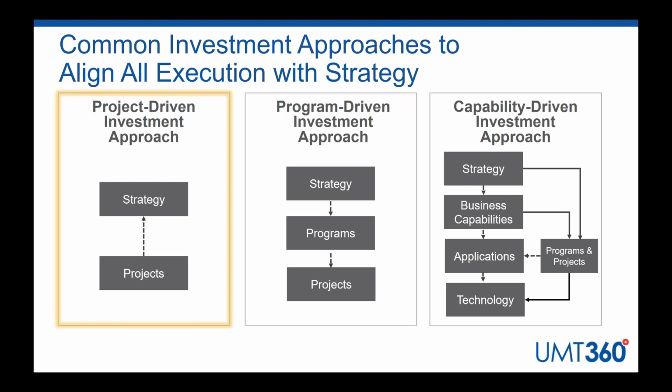First, the project-driven investment approach often starts with the definition and prioritization of strategy, often by execs and stakeholders in a silo. And then it's normally used in more traditional annual planning techniques. So when you hit that annual planning horizon within the year, project requests get teed up, whether they're going to be executed in an agile manner or through a traditional waterfall approach. Using semi-sophisticated techniques, impact assessment and mapping projects to strategy, and then using optimization and capacity planning techniques really to select the best bundle of projects and work that aligns with the strategy.